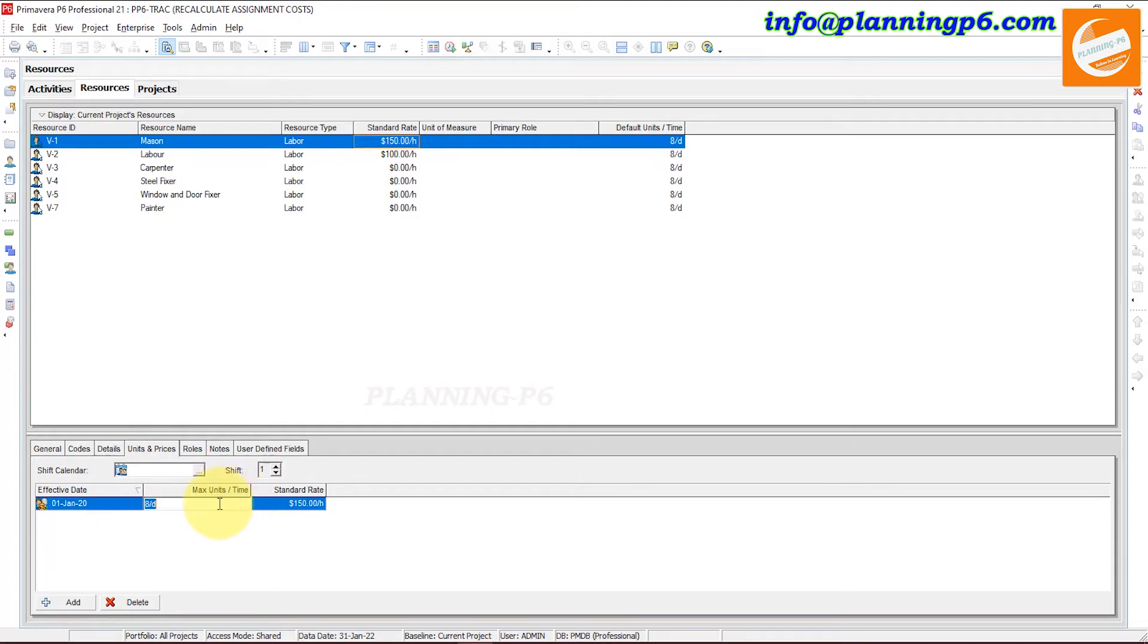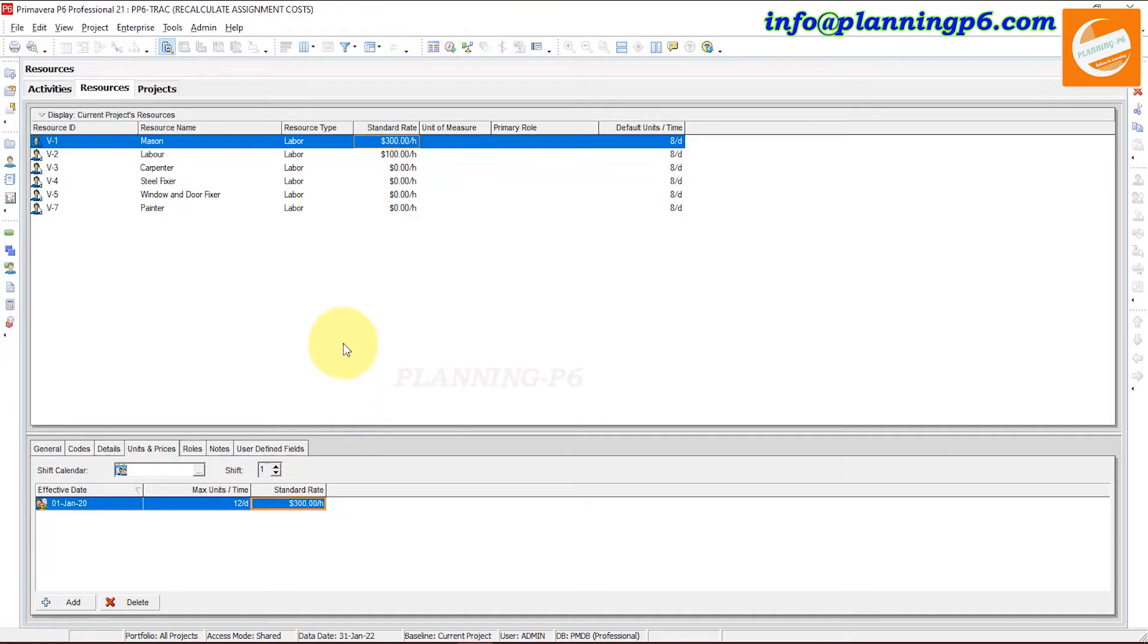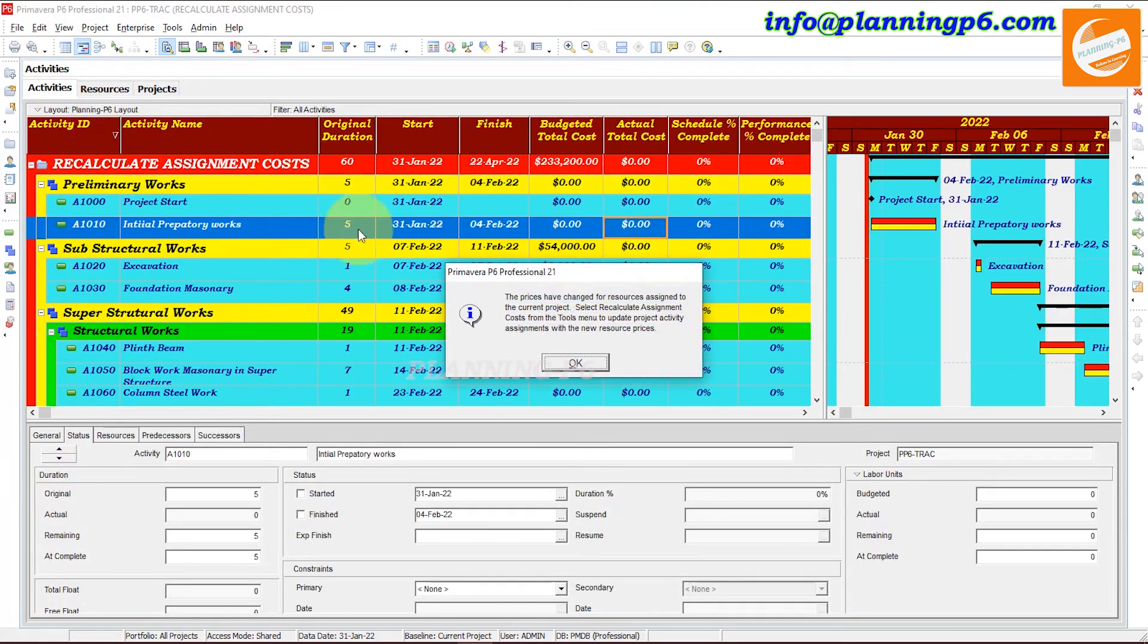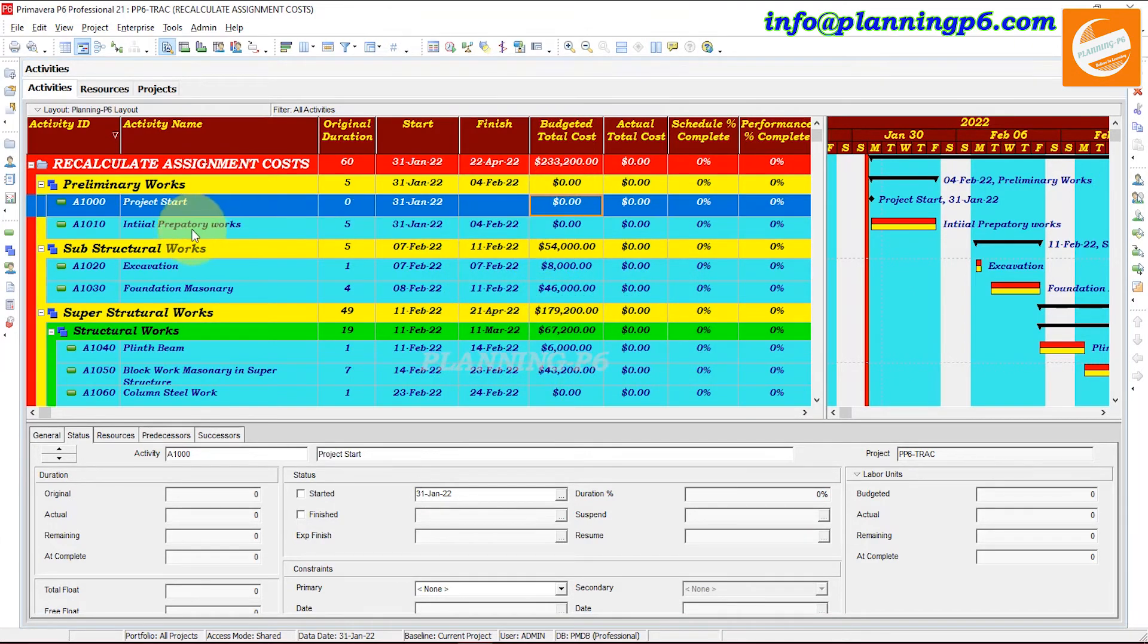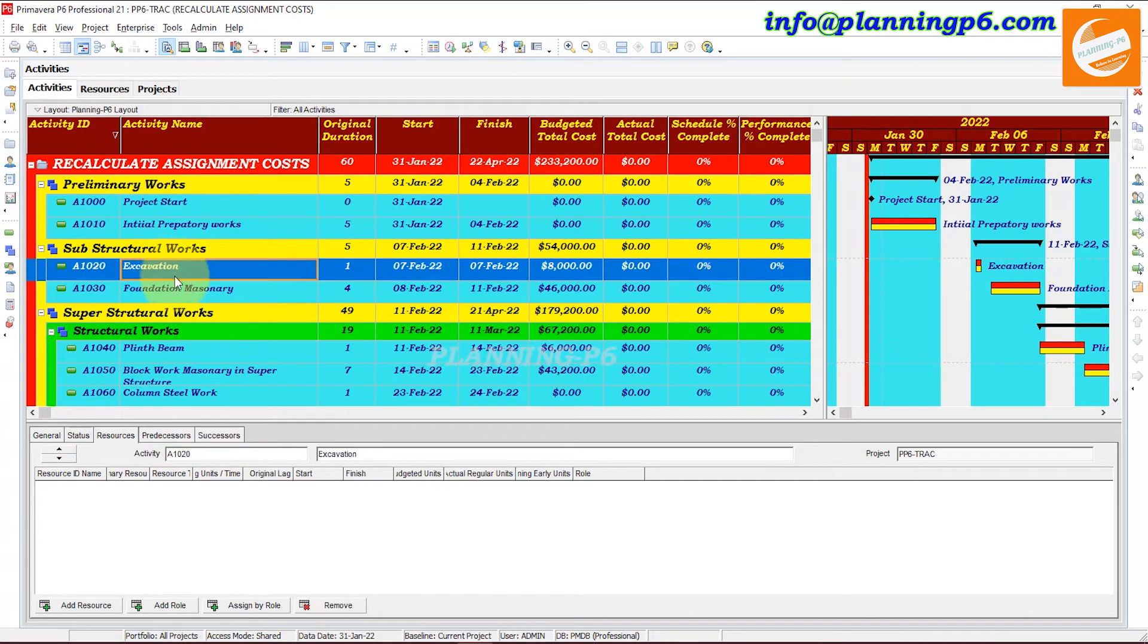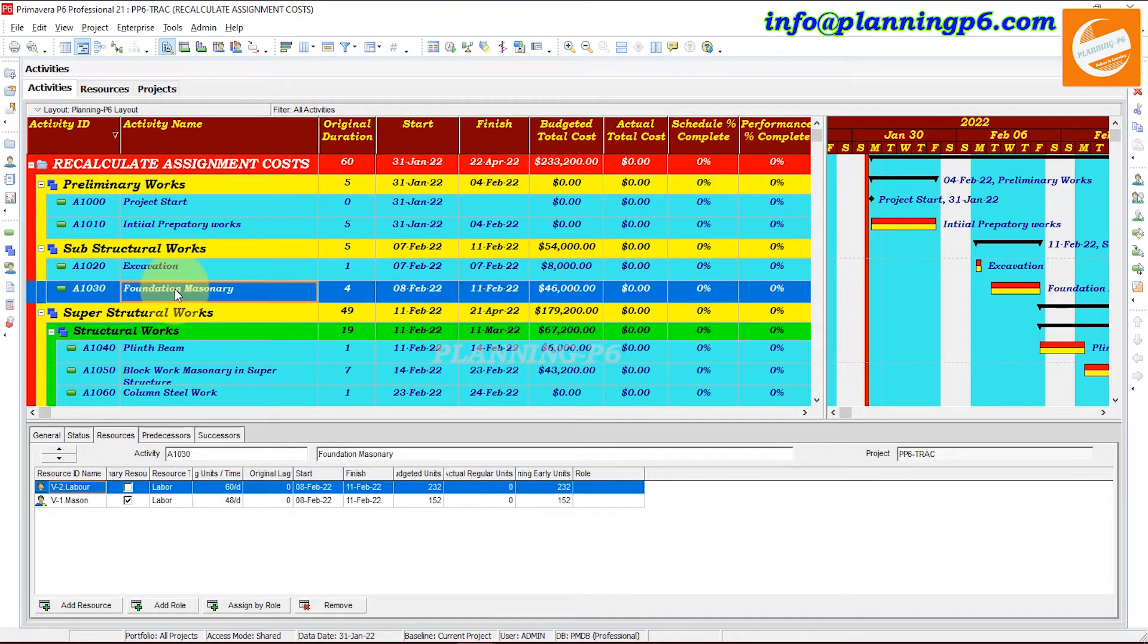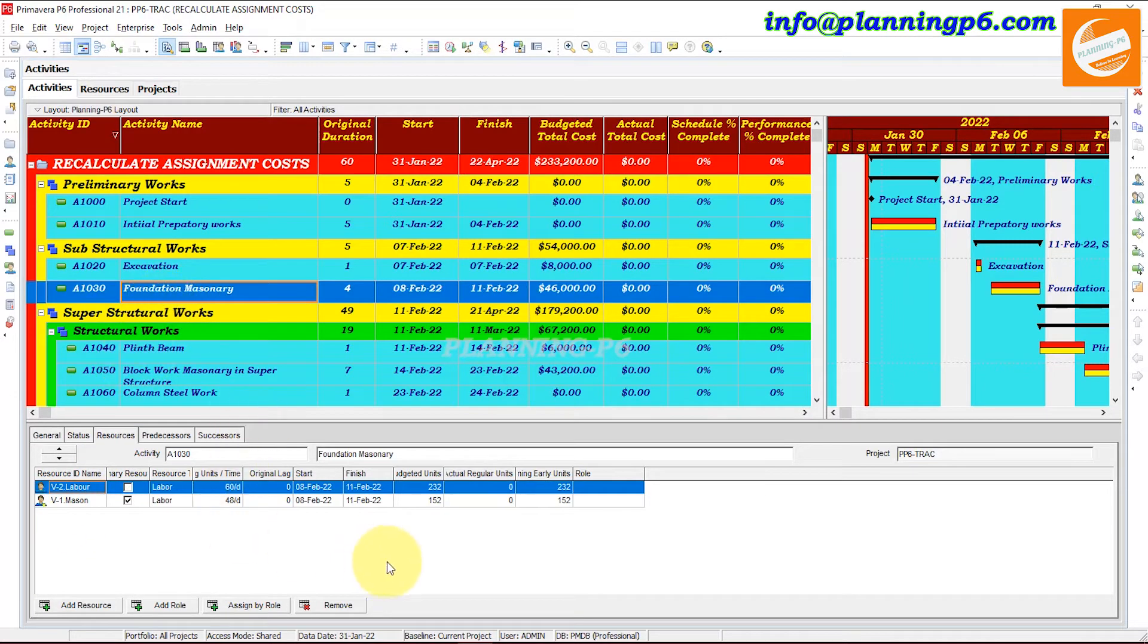Just say our maximum hours is 12 here, and standard rate is not 150 but you can see 300 per hour. Now we will go again in the activities and see where that resource has been assigned. So the mason, mason here you can see.